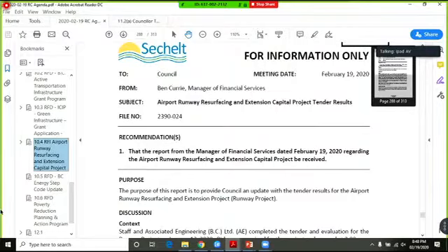In some cases the recommended tender bid that we received is utilizing some local contractors as subcontractors within their bid. So yes, and then to answer your first question, you may see some options to change the project depending on what's approved by the BC Air Access Program when this comes back to you again. So we will be looking at different options if we have to piece the project together to make a recommendation on what we can get done with the funds we have available.